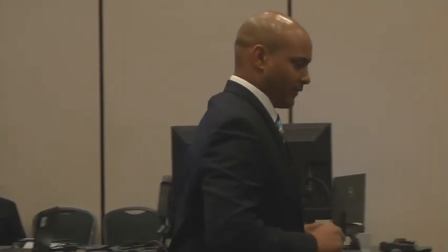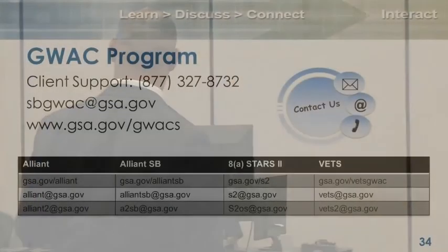Shortened procurement lead time, and I've talked about how great our industry partners are. Limited protestability. Anybody remember the threshold on the value where you're protest-proof? Well, I can't hold up 10 fingers, but Scott, I think I heard you say it, $10 million, okay? We support competition through fair opportunity. Even if you send something out on eBuy to 580 industry partners and you only get 2 responses back, that's not our problem. We gave everybody an opportunity, right? So we've taken care of that through eBuy. And flexibility of contract types: firm fixed price, labor hour, time and material, cost reimbursement type contracting. All those can be done on our GWAC.